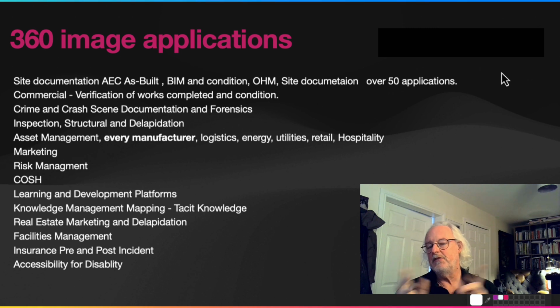It's interesting, some of the companies, and there's one water utility company who found this, can't tell you who they are, but what they found is by embedding 360 tours into the commercial documentation at tender stage 1, it decreases the cost of tendering by about 25%. But also, they found that it reduces the final cost of the tenders by about 15%.